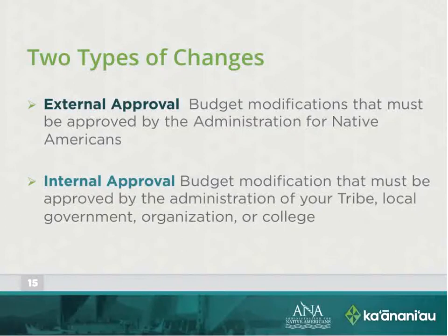We had a grantee from the Administration for Developmental Disabilities that proposed to modify their conference room and intended to charge 100% of the modification effort, which totaled $55,000, to ACF, to our grant. Although the grantee didn't need our prior approval to implement that, the grantee submitted a copy of the budget modification as an FYI to be included in the official grant file. We discovered by reading the modification that at the time the conference room was being shared with other non-ACF programs, and consequently those other programs had to bear their share of the cost to modify the conference room.